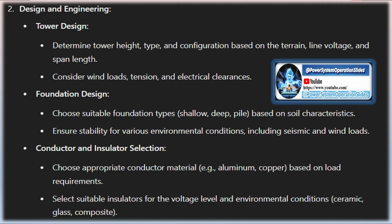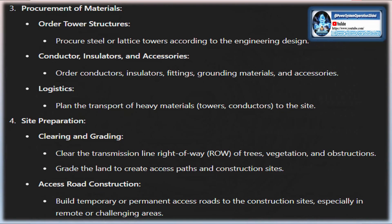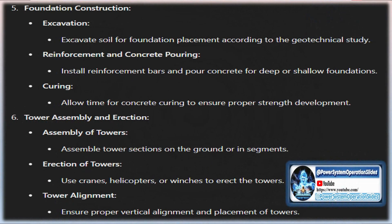One of the key aspects of this phase is the minimization of environmental and social impact. The proposed transmission line route must avoid or minimize interference with environmentally sensitive areas such as wetlands, wildlife habitats, national parks, and conservation zones. Additionally, densely populated urban areas should be bypassed to prevent disruptions to communities, reduce potential legal disputes, and avoid costly compensation for land acquisition.